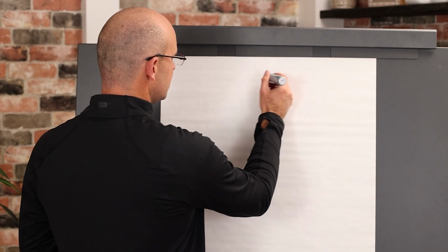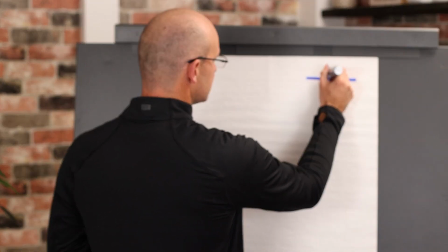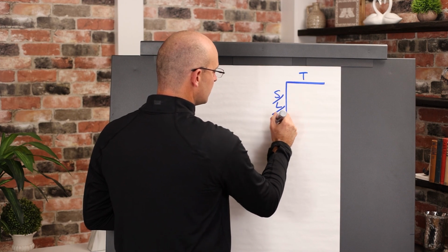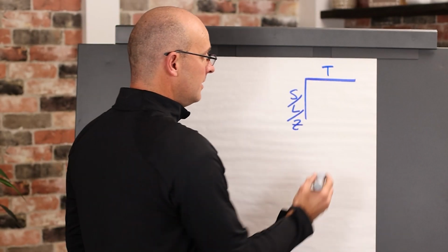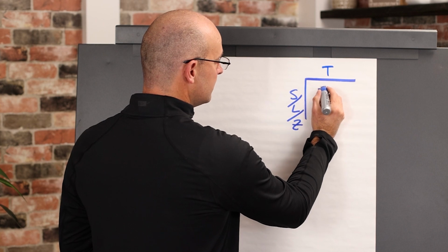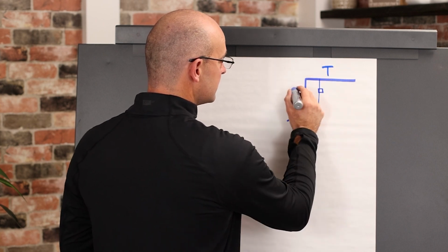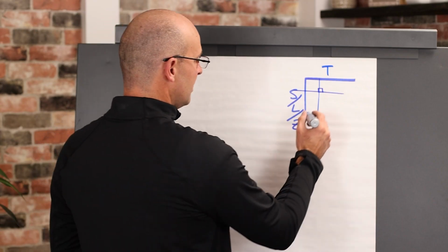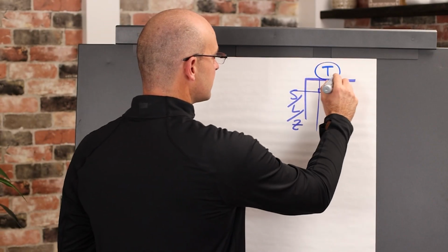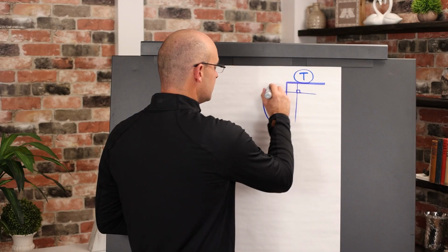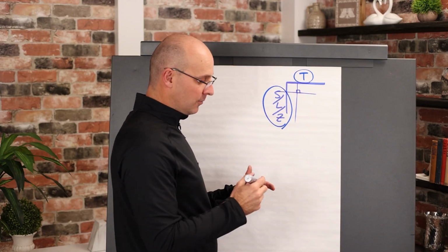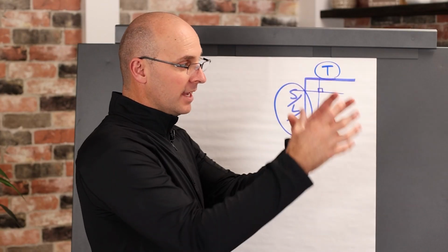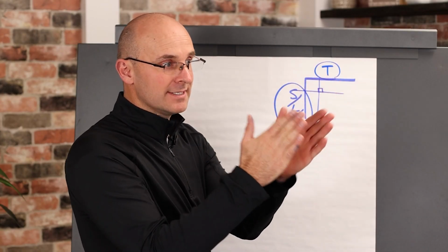So the visualization of time and space, like we talked about, was time by space, or you could say L for location or Z for zone. And then the actual work that's to be done shows up in a matrix inside that schedule. So takt planning literally does this. It puts it in the right format on a takt time, hence takt planning, by location, right? That way we know what locations the work is going from and to on that beat from area to area, right?